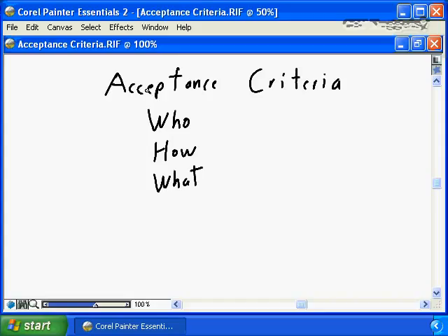The next step in the process is to define the acceptance criteria. How are each of the deliverables, how are each of the end products for your project going to be accepted? Only by clearly defining the acceptance criteria, i.e. only by defining the yardstick, the measurement factors that will be applied against the deliverables, the final products, will you truly be able to define the scope of what those end products should look like.